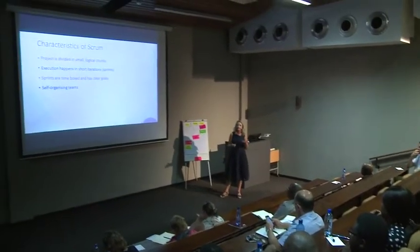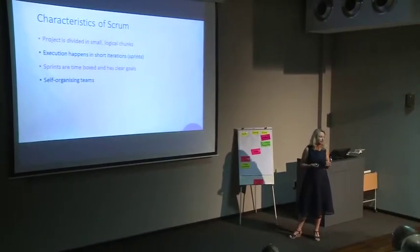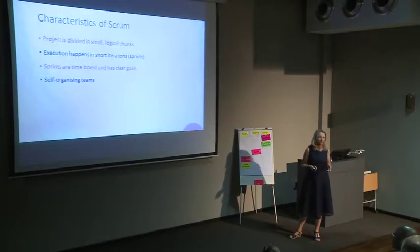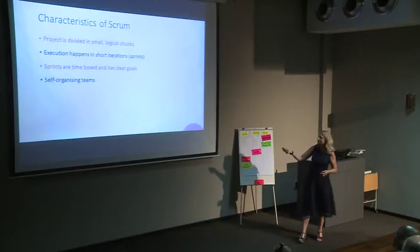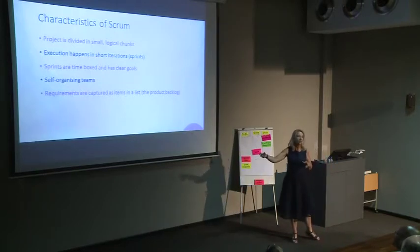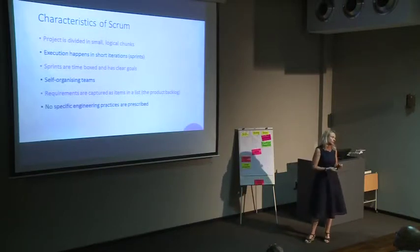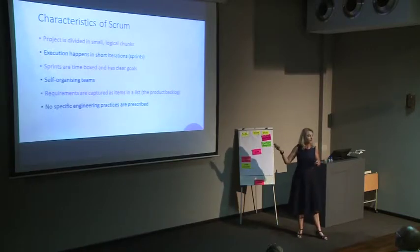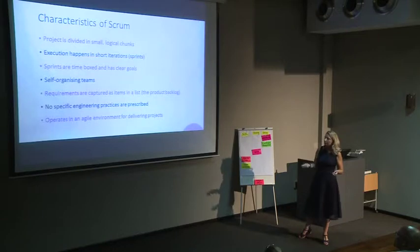Self-organizing teams — the guys decide how to do the work and just get it done, nobody checks off on them. If somebody comes in late and leaves early, the team sorts it out. When you're all accountable to deliver something at the end of two weeks, the team actually does manage it. Requirements are captured as items in a product backlog list — on those little cards we put it on the product backlog, and during sprint planning we decide the goal and take tasks off the requirements list. No specific engineering practices are prescribed for Scrum — it works very well with extreme programming but that isn't required.